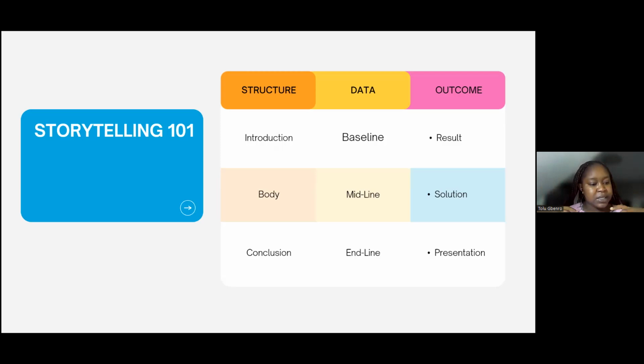So take, for instance, the Nigeria Youth Future Fund climate education project that I implemented. I learned a lot about budgeting from that project. It was not the first time handling a project, but I was running it on limited resources. I planned to train 40 teachers. And when I was budgeting for the food, I forgot we had volunteers. And it's a mistake a lot of us make in budgeting.